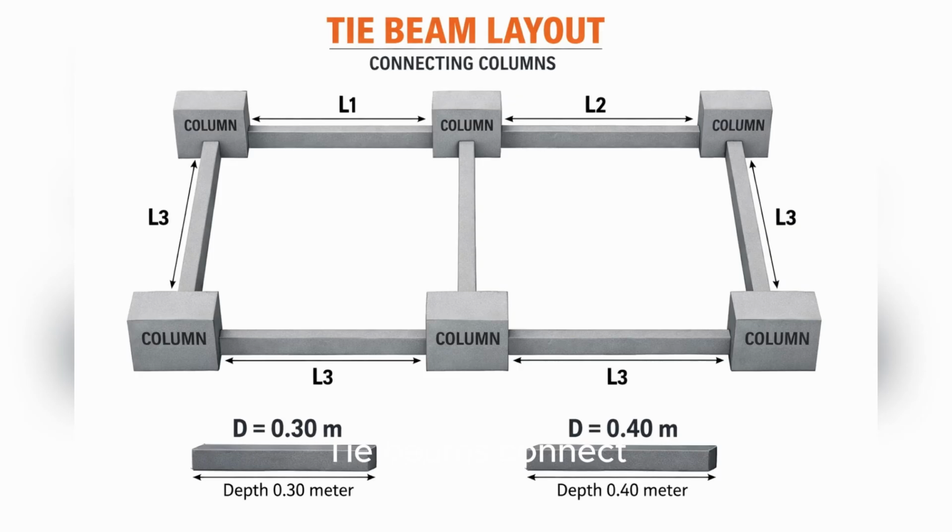Tie beams connect columns and distribute loads across the foundation. DPWH computation measures tie beams by length, width, and depth. Long continuous beams may appear simple on drawings, but their combined volume often surprises homeowners when converted into concrete quantities.